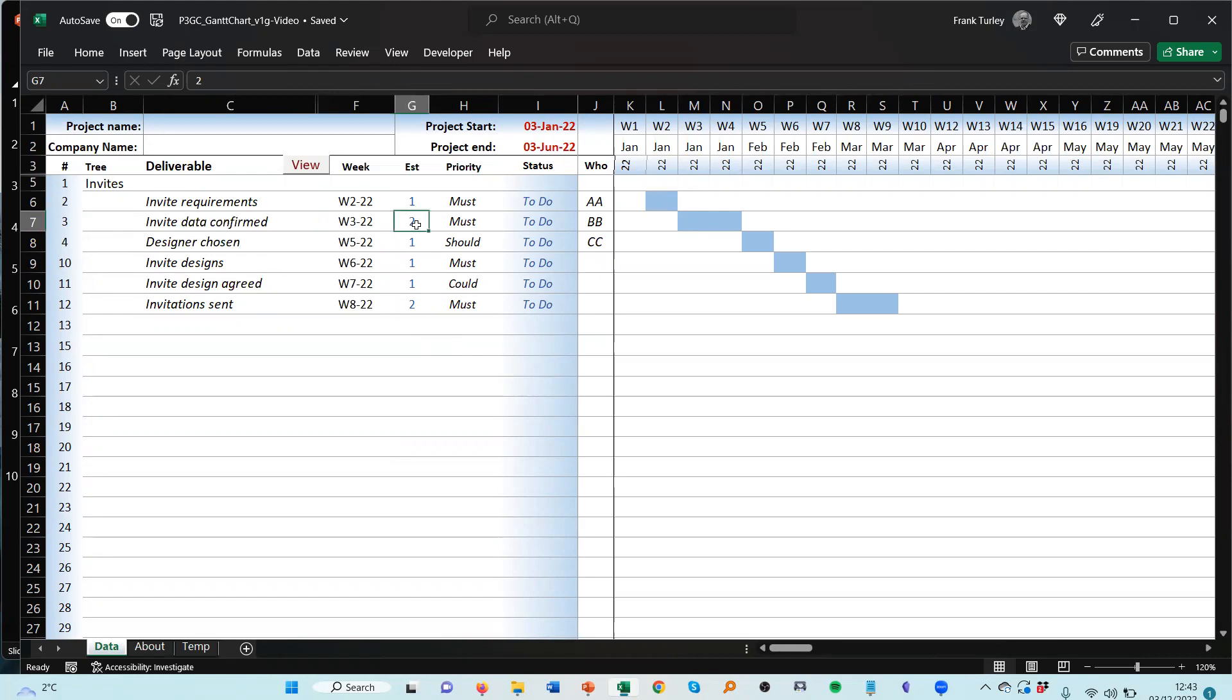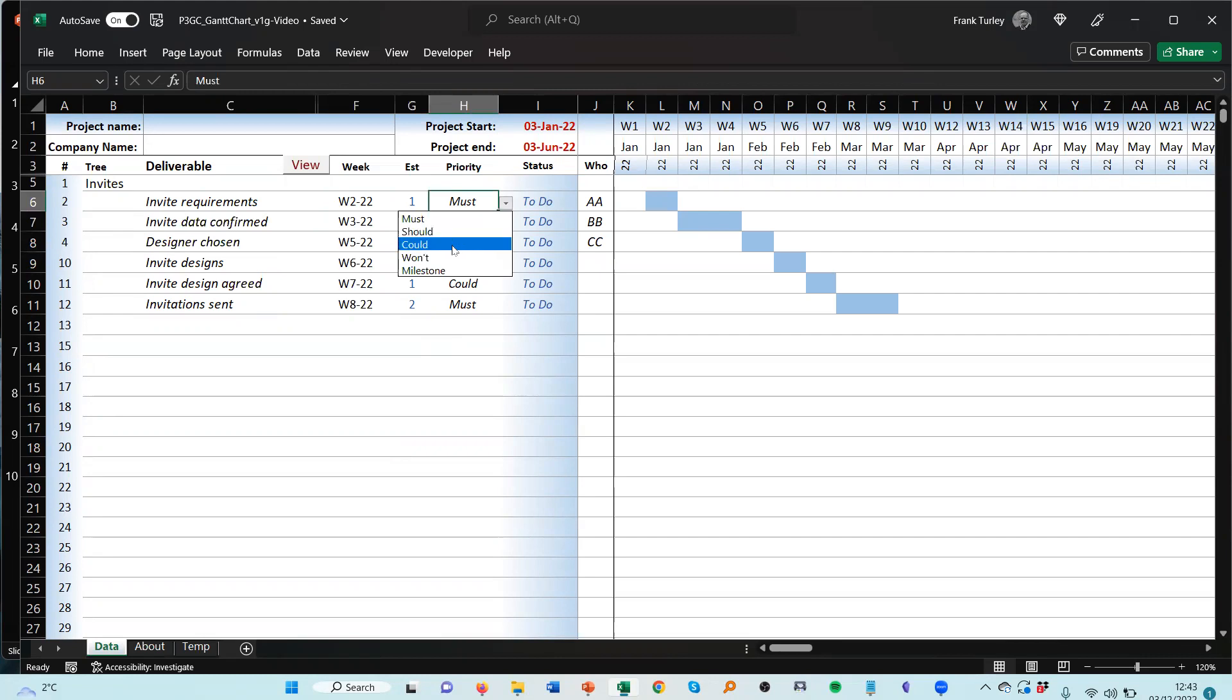And then we have the week number here. You can choose a week number, then we put the estimated number of weeks. More about that in a moment. Then you choose the priority. That's based on MoSCoW, but there is must, should have, could have, or won't have.